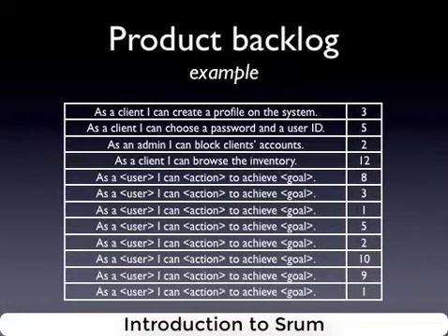as user stories. And here we see numbers, and those numbers are estimates. Those estimates can be expressed in various units depending on what your team uses, what your custom is. It can be so-called ideal days, trying to imagine how many days it would take an ideal developer, if he was doing only that thing, to complete this user story or deliver the software that would enable it to be completed by the user.